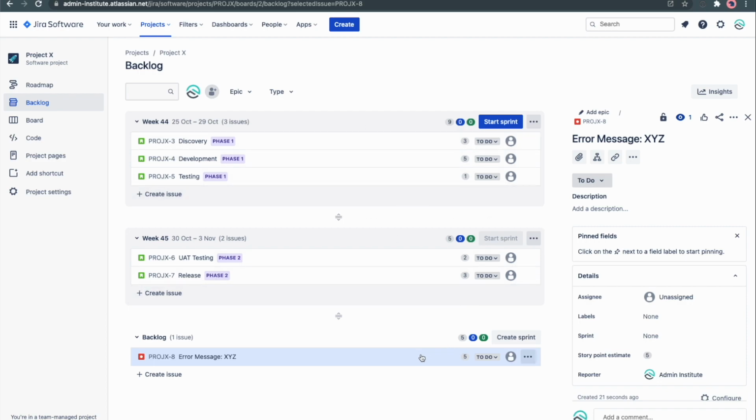So it gives you a way to gauge how busy your weeks are getting, and you can better set expectations with your stakeholders as you start to mature in your process and understand what your velocity is. How many story points can you get done within a given sprint?